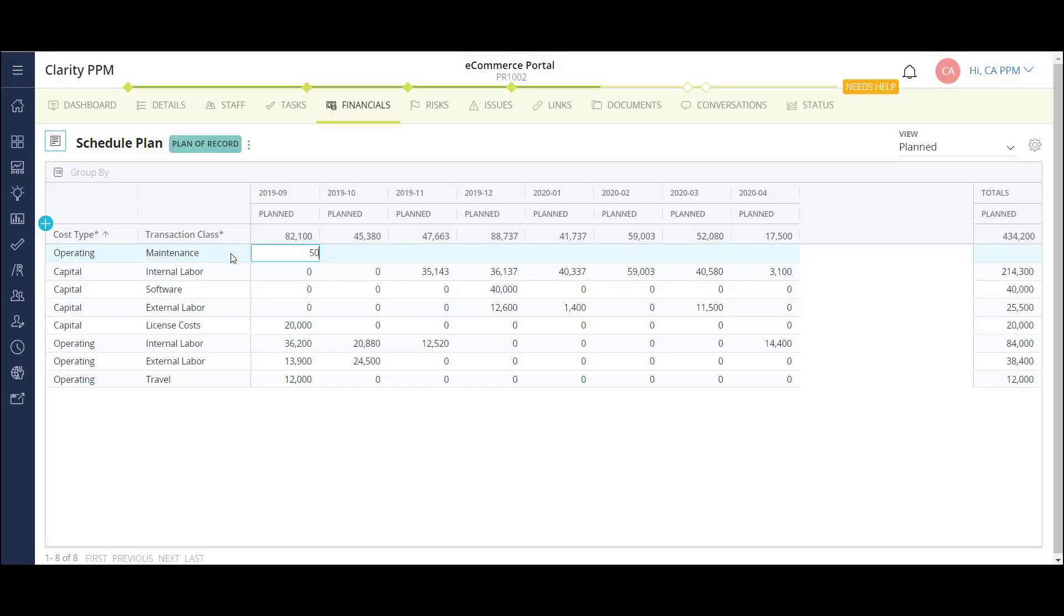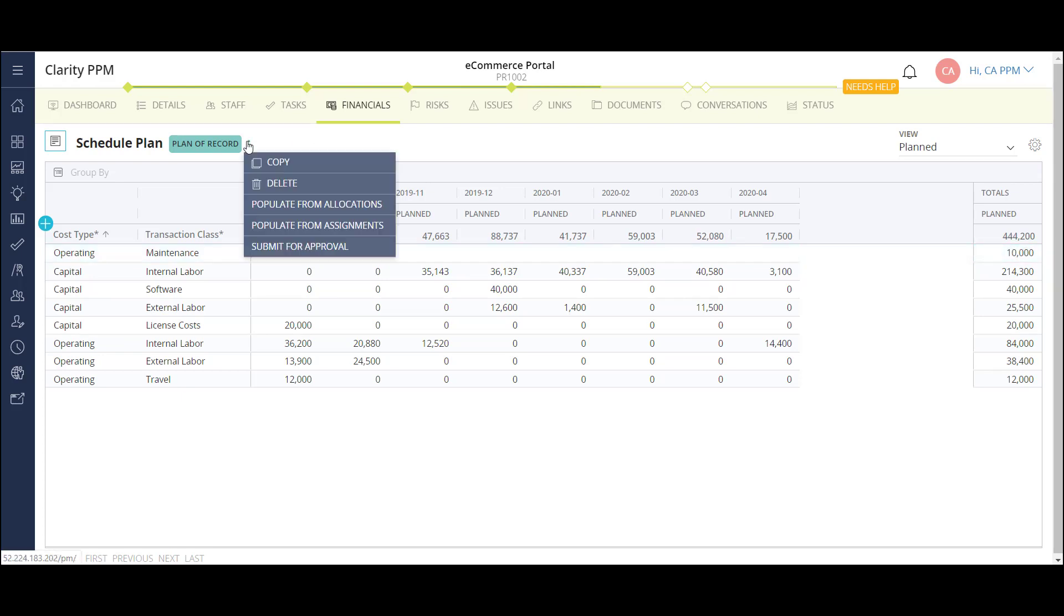I can also populate the grid using my resource allocations on this project. This option will take the allocations from the project team, or the staff page we looked at, and populate the grid based on their corresponding rates in the back end of the solution. This option is a little more detailed and much more time effective.